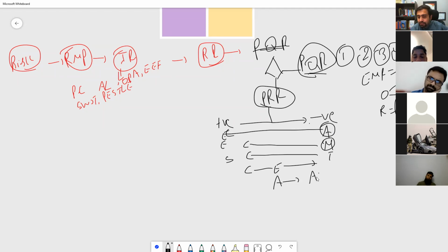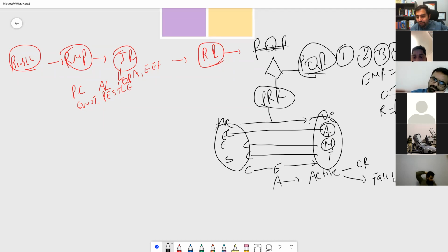So if you actively accept that, you put a contingency reserve for that. If that risk occurs, I will do this thing. Here you are taking a proactive action, and in passive acceptance you are not taking it. You are saying, if it occurs, I will do this thing. You have a contingency reserve for it. You make plans, and you also have a fallback plan, plan B. If plan A fails, you use plan B, the fallback plan.